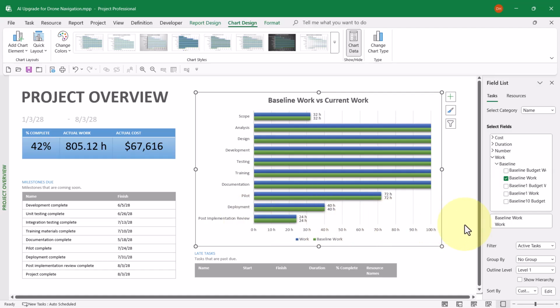Now there's one final problem with this bar chart. It's a residual problem caused by displaying the percent complete value in this chart. And that is the maximum percent complete value I could ever have is 100%. Well, the x-axis is limited to showing no value greater than 100.